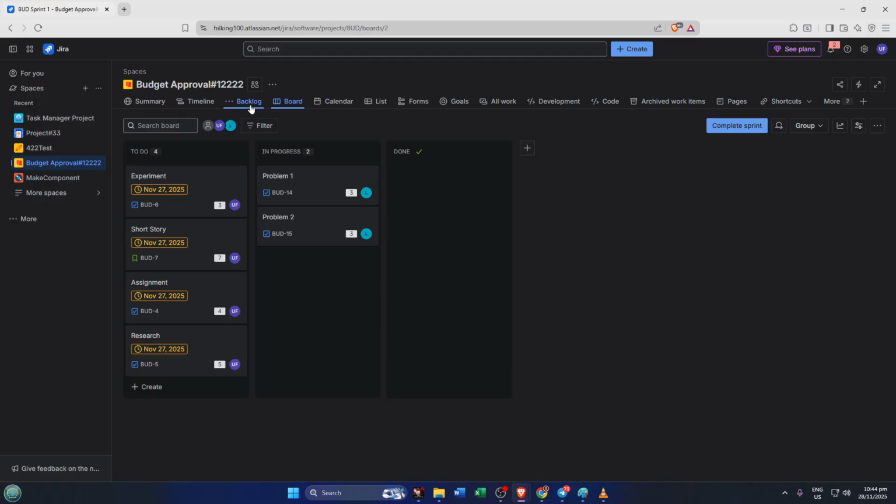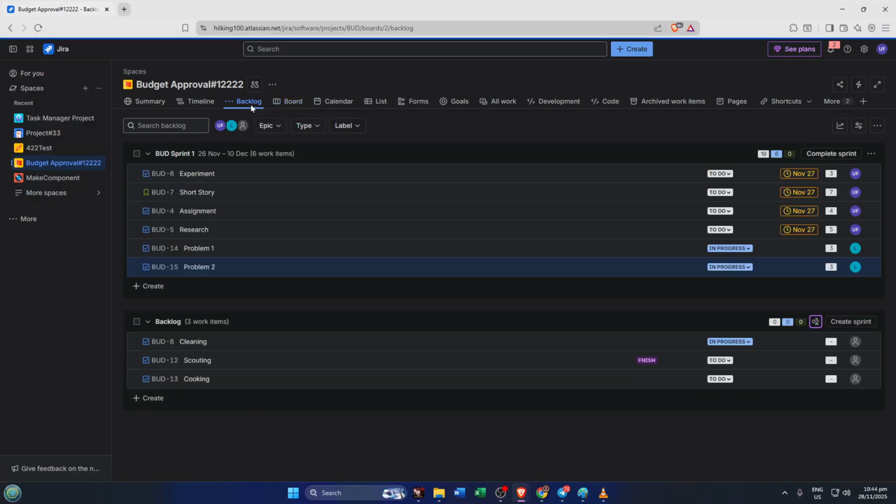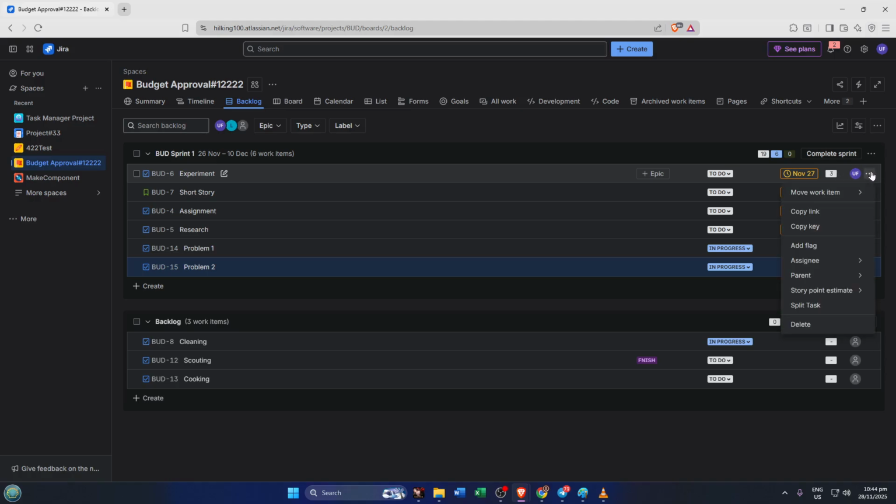Moving on, and this one's important guys, to customize these settings, you need to have either project or board administrator rights. If you have this power, go ahead and steer your course to your project in Jira Cloud. Once there, you'll want to look out for the left-hand navigation sidebar where you can select either the board or backlog. Here's a little tip. Keep your eyes peeled for the More Actions menu, which is denoted by 3 tiny dots. Usually this is the key to the kingdom of board settings.